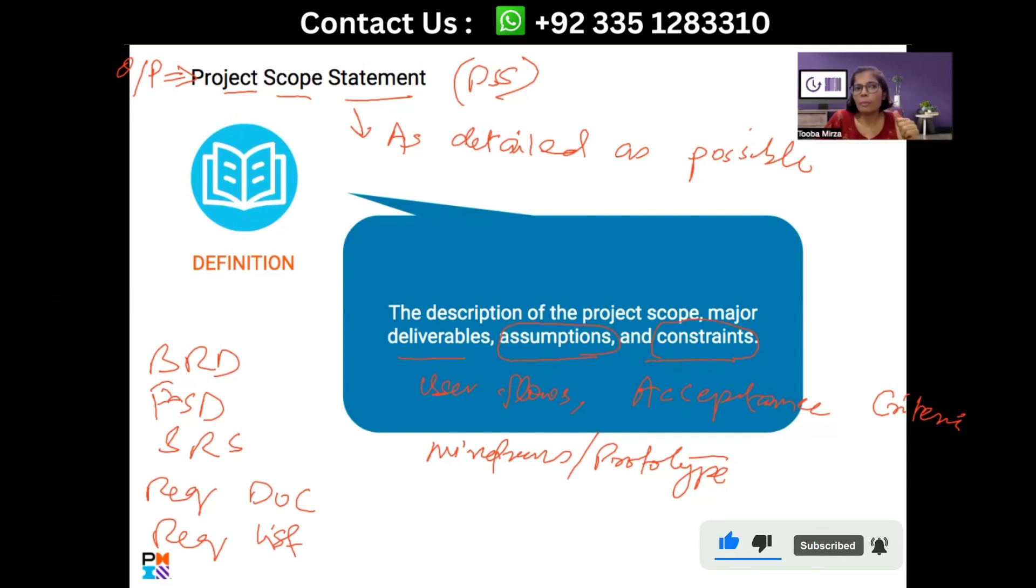Let me give you an example. When you started off the planning phase of your project, you got an idea from your management that for this project, you most likely are going to get five development resources or project team. On that ground, you have done all the planning for your project and you have documented this limiting factor as well in your project that this is a constraint, that we can't get more than five. And in the assumption for the same constraint, you have written that the project planning is done on the assumption that,